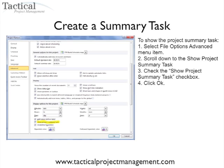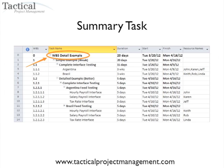To access that, you just go through the File Options menu, scroll down to the Advanced section, and click on the checkbox that says Show Project Summary Task. It'll instantly create a summary level in your project schedule. Previously, people would have to insert a task and indent all the tasks one level in, but this way you can create the summary task automatically when you start building your project schedule.